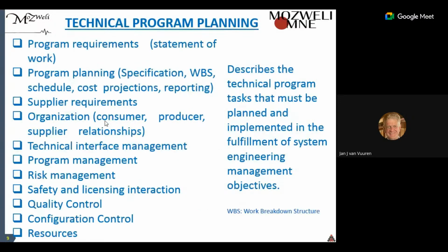The technical program planning, if I can go a bit further into that, describes the technical program tasks that must be planned and implemented in fulfillment of the systems engineering process. And I mentioned here the program requirements, when are we going to write statements of work, of what has to be done. Program planning, work breakdown structure, schedule, cost projections, etc., based on close cooperation with the program manager.